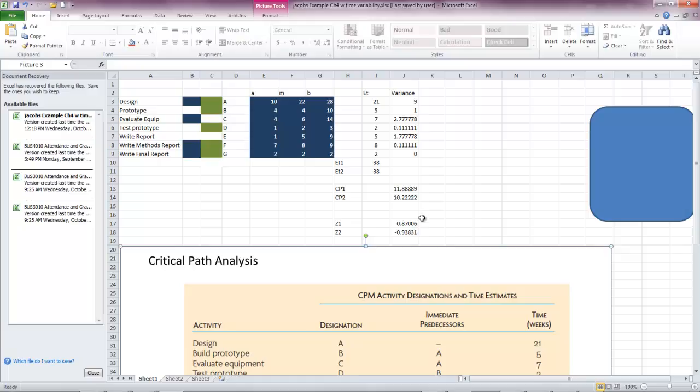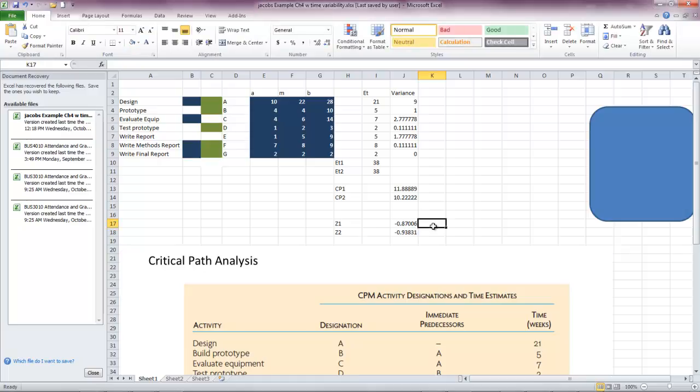We knew the probability of this one up here was on the order of 19%. We had to do an interpolation in the table. And if we look up in Appendix G, minus 0.93, what is that close to? That's close to minus 1. And that's just an interesting point on our curve in the normal distribution, because it's around minus 1 standard deviation. If it were minus 1, that means you're 1 standard deviation away. We're minus 0.93 standard deviations away from the 0 point, and